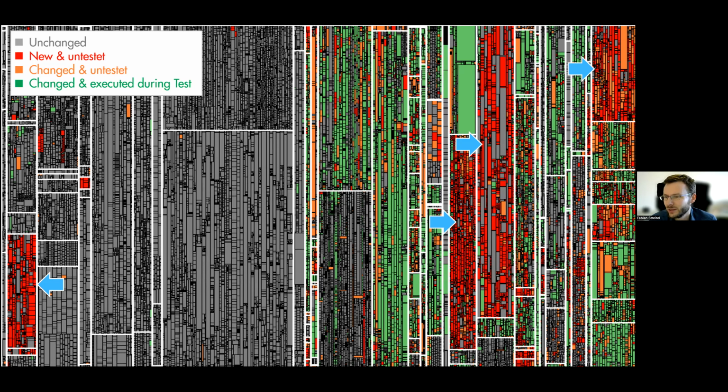What happened here? Why did the team miss so much of the new functionality? The reason in this case was that they were actually trying to automate all of the test cases for the feature tests for all of the new functionality. So they had a big test automation project where they tried to write a lot of automated tests, but unfortunately that completely failed. So not a single test case for the new functionality was finished, and the testers in India only got the regression tests, so for the old functionality. So they did everything right, but they only had part of the picture. There was a bit of a miscommunication there. And so in the end, the new functionality basically didn't get any tests.